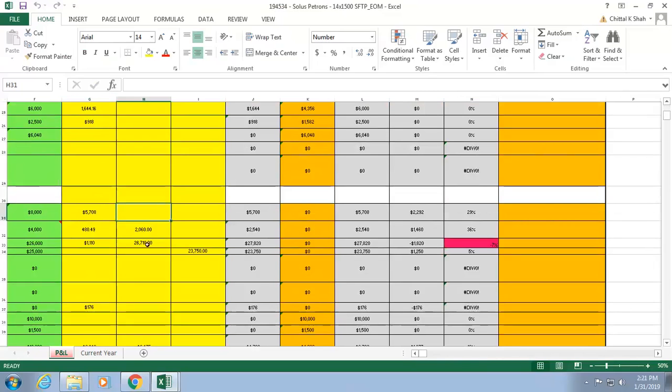Correct. So let's say this $26,000 is received, but they're not vouchered. Next month you'll see that 26 jump into that one. Okay. Column G. So they don't duplicate each other. One, it travels. If you literally want to see, it travels. Yeah. It goes from here to here to here. And depending on what stage you catch it, you will see that snapshot in that stage.